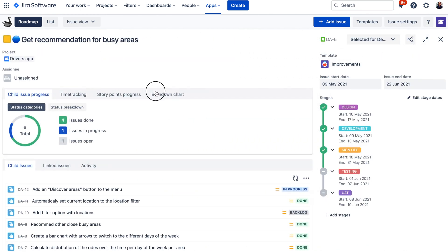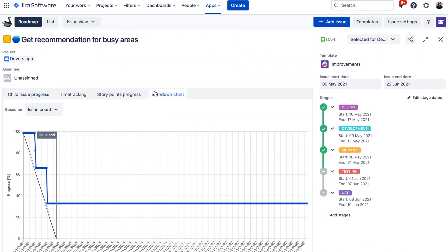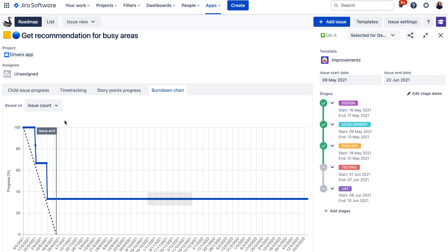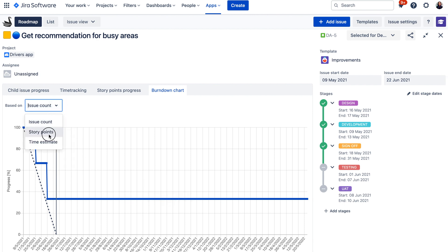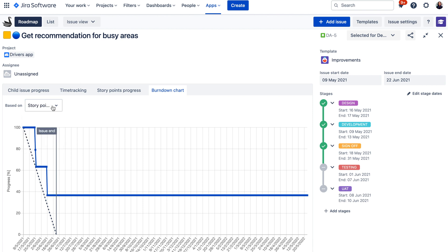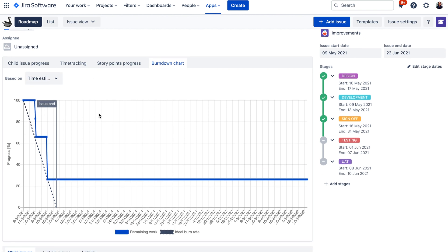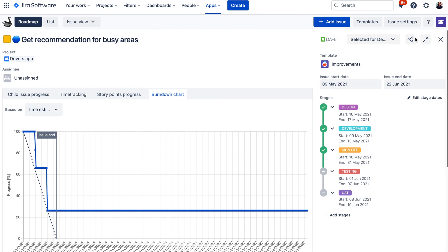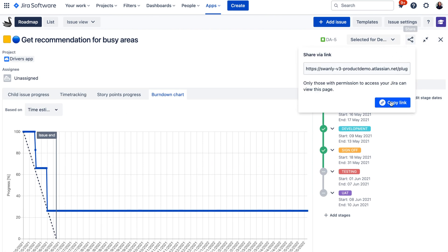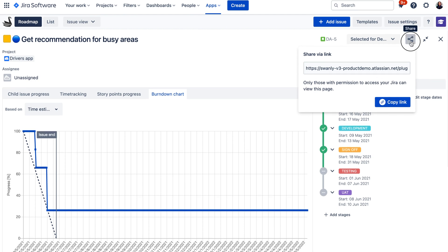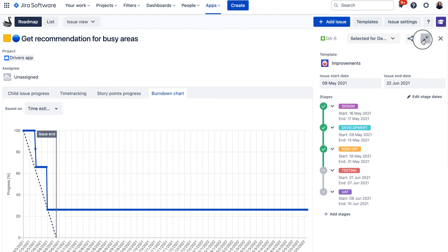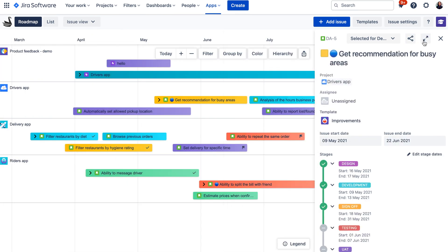There is also a burndown chart where you can see the actual progress of your tasks over time. You can choose to draw the burndown chart based on issue count, story points, or time tracking. You can also share this report — clicking the Share button provides a URL you can share with your team so they can access this exact report, as long as they have access to your Jira and Swanly.